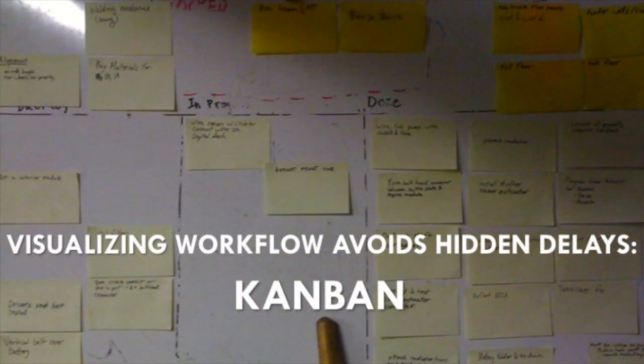We use our backlog as a value stream map. So we continually change the columns in our backlog, in our Kanban board. We change the columns of our Kanban board, of our sprint planning board, dynamically to reflect the real-time flow of the work we're doing. That way, it serves as a value stream map continuously. If a Lean Six Sigma black belt visited one of our shops, that would be fantastic, and we'd love to hear what they would say. And when they do, we take advantage of it. But we don't want to wait for that input, so we make sure our backlog models our current flow so we can identify any time spent not creatively solving problems.